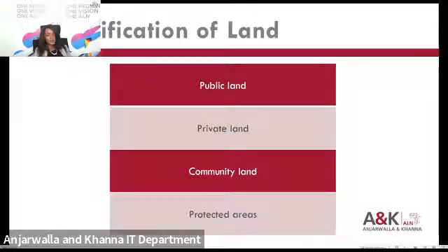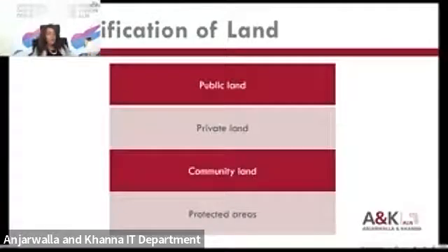For example, for public land, there are public land allocation regulations that must be followed before a project company can be vested with public land, and they'll have to meet all the requirements under statute in order to get indefeasible title to that land. When it comes to private land, it's relatively more straightforward, because what the project company has to consider is the contractual agreement between the project company and the private landowner who owns this land.